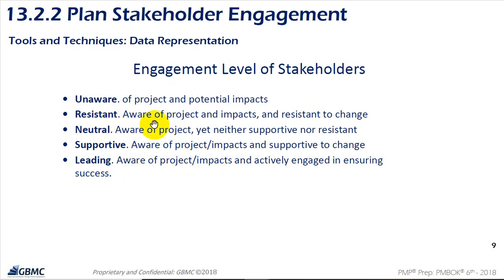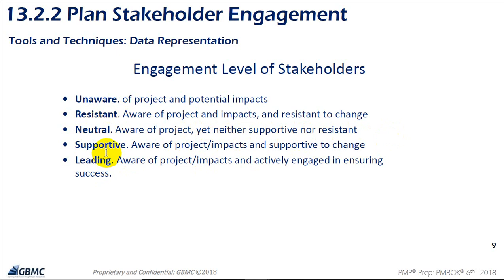A stakeholder can be resistant — meaning they are aware of the project and its potential impact but resistant to it. They can be neutral — aware of the project yet neither supportive nor resistant. They know the project but it doesn't affect them, so they have neither support nor opposition.